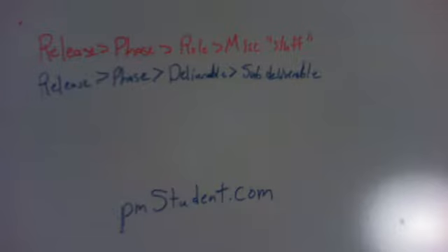And a couple things here. If you've read my free report on the work breakdown structure, or if you've gone through WBS Coach, you'll know that this is one of the big no-nos that I talk about, is organizing a work breakdown structure by role. When you actually start defining tasks and things, then obviously having it broken out to individual people is not necessarily a bad idea, but you can really have a task that you resource load several people against as well.